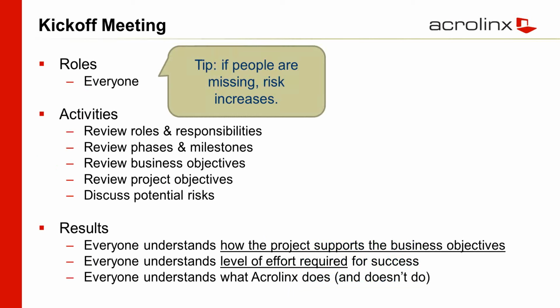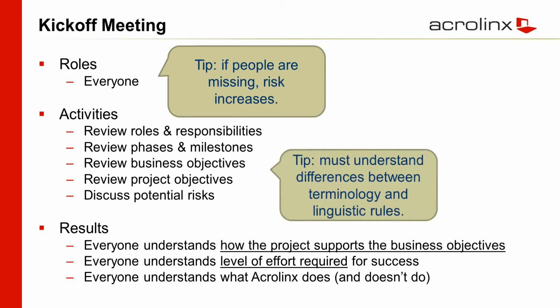But what really starts the project is a kickoff meeting. And everyone involved in the project needs to be at this meeting. The Acrolinx professional services team, as well as all the key roles within your organization, need to be involved. If someone, such as a project sponsor, can't be there, has something more important to do, it increases the risk to the success of the project. It's absolutely vital to have everybody there.